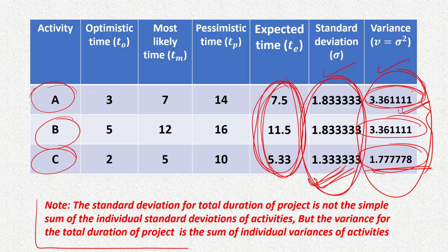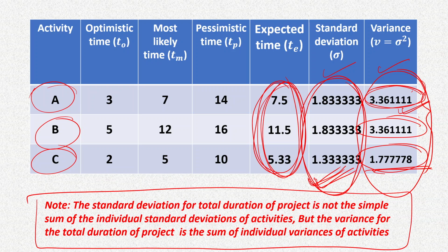So please remember why we are having to calculate the variance as well, because in the final calculations it is not going to be used only for this total duration. The standard deviation of the total duration will have to use this variance.